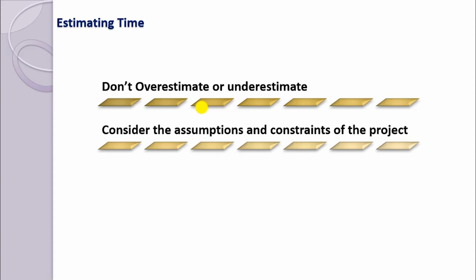If you're trying to estimate for work that will be performed by more than one person, that sub team needs to agree on an estimate together. I have done it, because if you just put an estimation together as a project manager, and I have seen such project managers, and you don't share it with your project leader or your team members who are actually going to do the work, then it is a disaster. The client will be asking you for deliverables, and it is a mess. But you have to come to an estimation. It is work being done by your team, and they should agree with it.